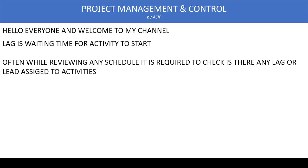Normally in general practice and per international standards, it is not recommended to assign lag or lead to activities. The reason is that when we update the program and activities assigned with lag or lead become non-critical, the lead time will delay the project by the amount it delays the start of the activity.